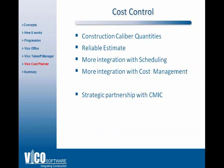There is typically a disconnect between pre-construction estimating and field cost control. And by establishing a strategic partnership with CMIC, we are going to be able to export all the cost information and quantity information from the model into an accounting system and use that accounting system to monitor invoicing, to monitor payroll, etc. That system will not just serve as a system during pre-construction, but it also will serve as a system during construction. So the pre-construction and construction phases will be connected through the VICO Office interface.